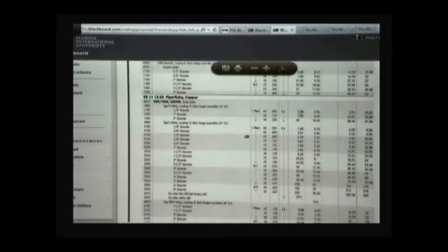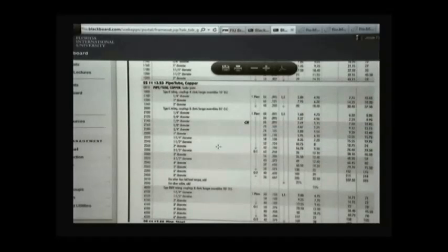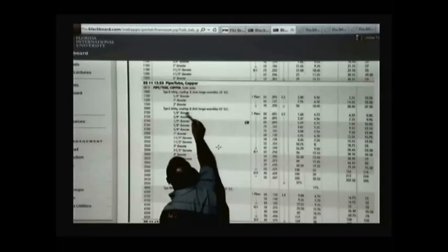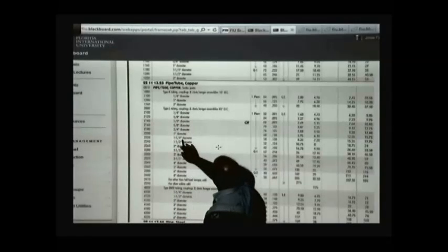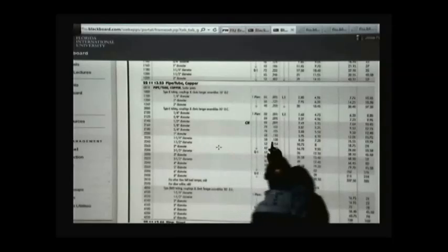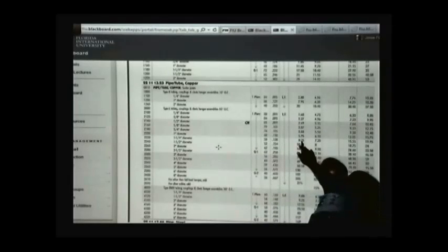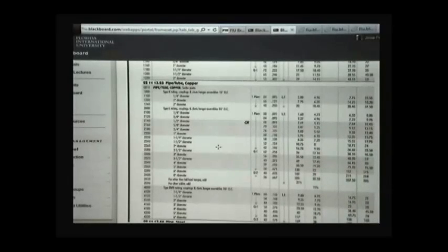So we have, see, this is the one that we were looking at. The specification said type L, so we have type L tubing. And then we were looking at 1¼ diameter, right? So for every linear foot, you have $835 in materials, $720 installation for a $1,555 total cost. So you can use that value in your Excel file.